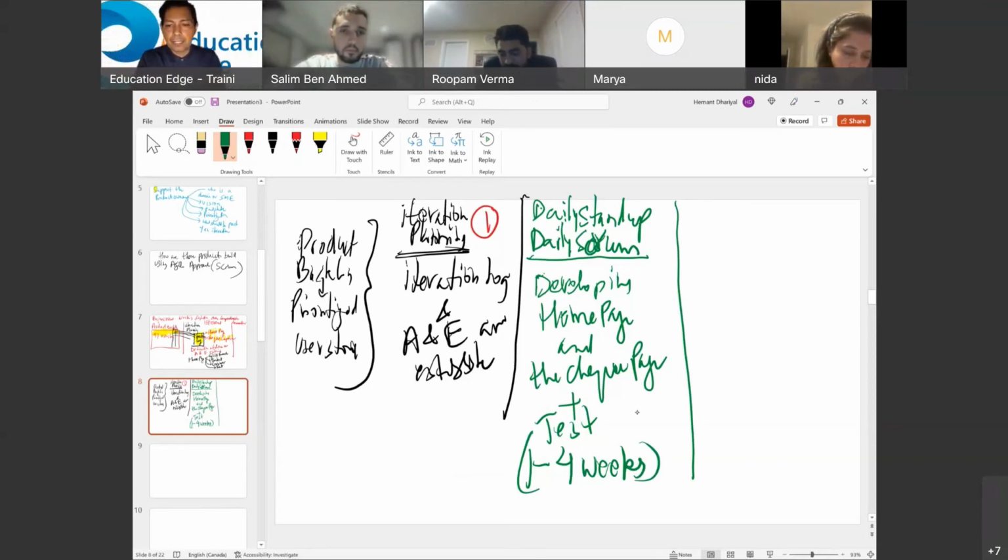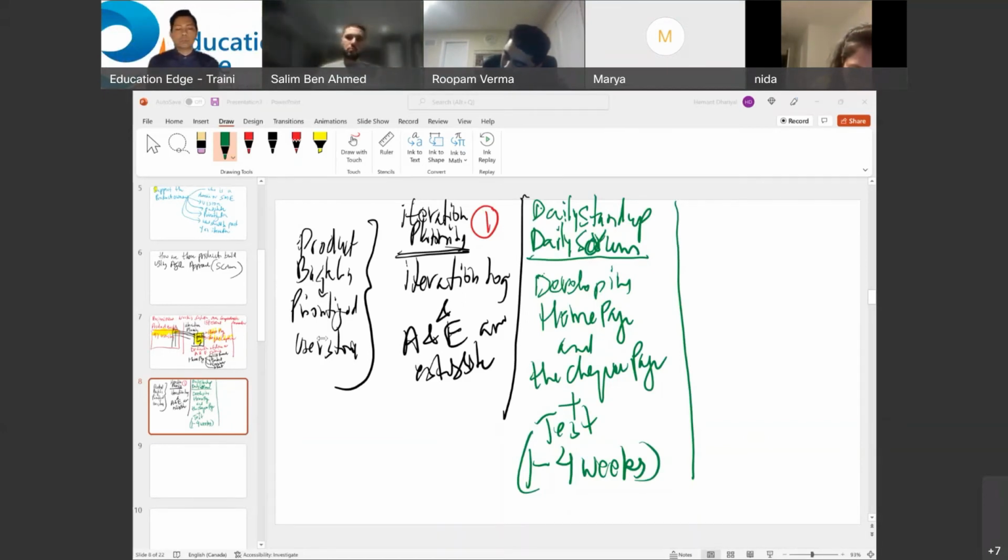So what is daily stand-up and daily scrum? Every team member who is part of this development team speaks about: what did I do yesterday? What am I planning to do today? And are there any impediments or roadblocks that we are facing? So we speak about three things.